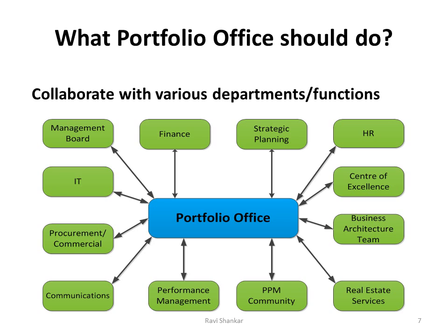Procurement or commercial: this is to engage external service providers. When the portfolio office projects the number of projects in a one-year or three-year plan, procurement should be aware of what's coming in the pipeline. Accordingly, they can convey this message to the external service providers so that we have appropriate resources from those areas.